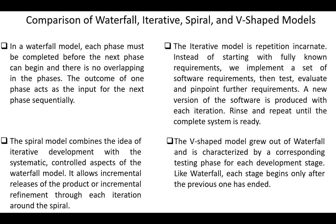The iterative model is repetition incarnate. Instead of starting with fully known requirements, we implement a set of software requirements, then test, evaluate, and pinpoint further requirements. A new version of the software is produced with each iteration. Rinse and repeat until the complete system is ready.